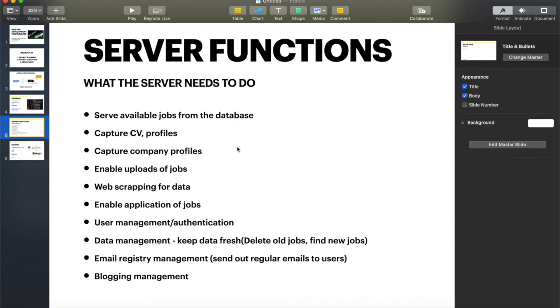And I've had this happen to me a couple of times, where a client comes to you with very vague requests like, I want you to build me a job portal, and they go away. Then you give them a quote, and a month, 2 months later, you give them a job portal, and they're like, no, but it doesn't do this, but it doesn't do that. And then you end up spending double the time doing change orders and revisions for stuff that wasn't clear. So at the beginning, if the client is not clear in the details, it's best for you to write those details down for the client and have him approve it, because this will minimize your change orders and revisions at the end of the project.